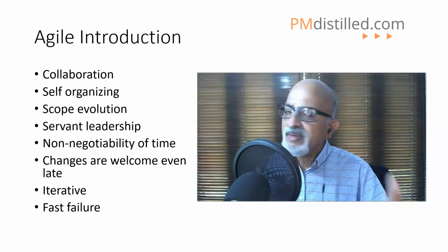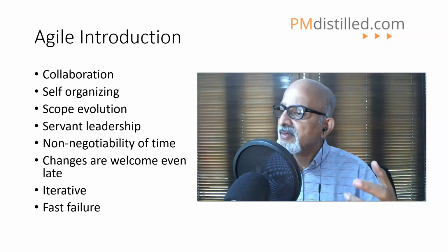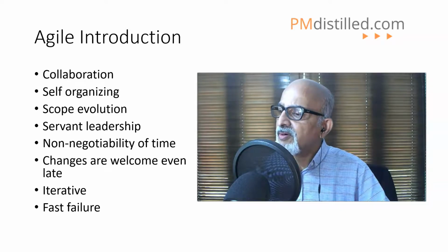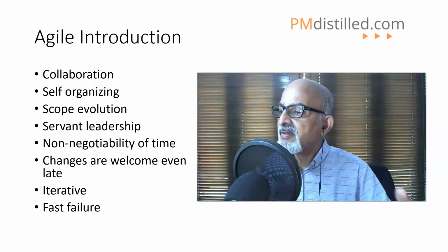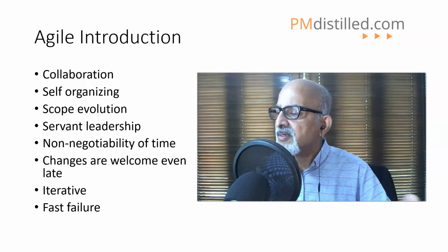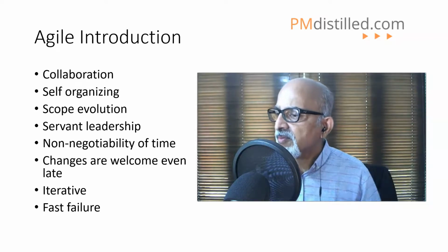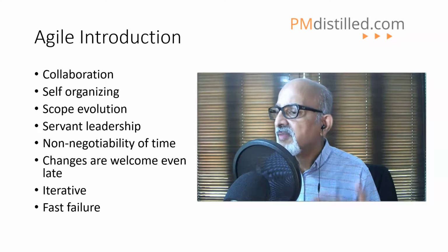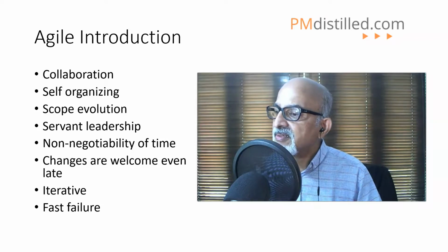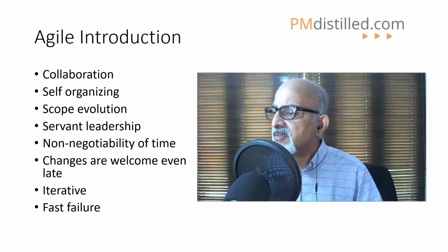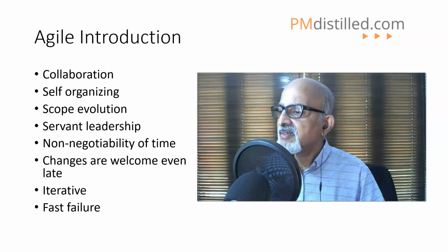And at the end of every 30 days, there is a formal review of what is being done, and if required, the increment of the product is demonstrated to the key stakeholders so that we can incorporate changes incrementally. That way, these functional risks are managed, and even the technology risks are managed incrementally.